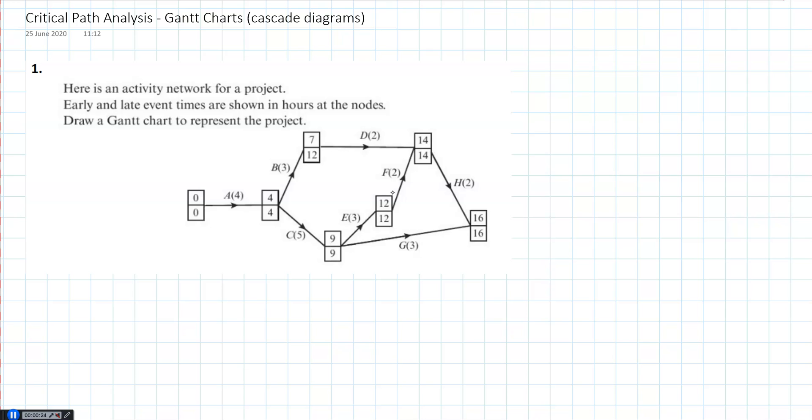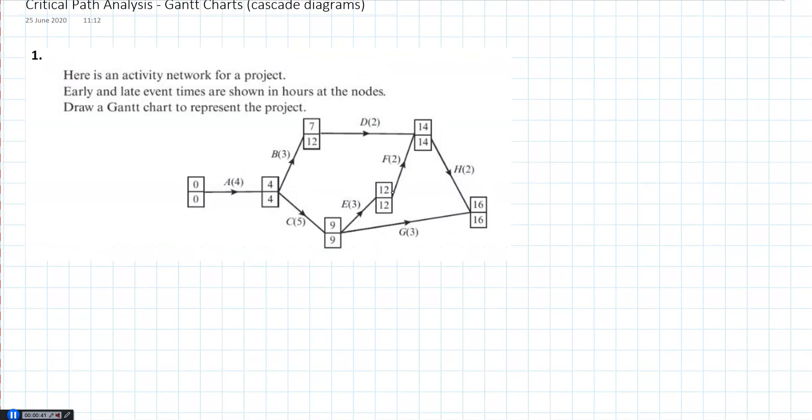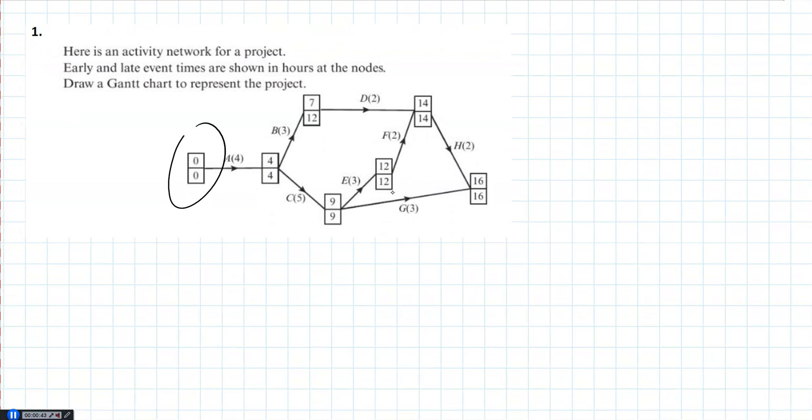So here's an activity network for a project. Early and late event times are shown in hours at the nodes. These are our events, these are our activities. Draw a Gantt chart to represent the project. To draw our Gantt chart, I've put grids on. First thing to do is to check when we start, which is obviously day zero, and how long it takes. So the last box is 16, so we need to have 16 days.